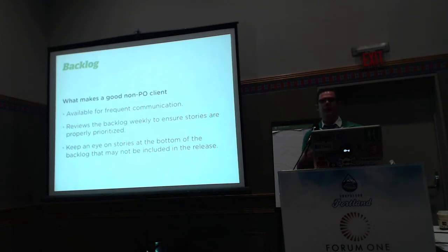So they need to make sure that the stories are constantly being prioritized so that when the next sprint begins, we as a team can simply scrape those stories off the top and begin work on them immediately, and not sit down and have to reprioritize every sprint planning after the demo.